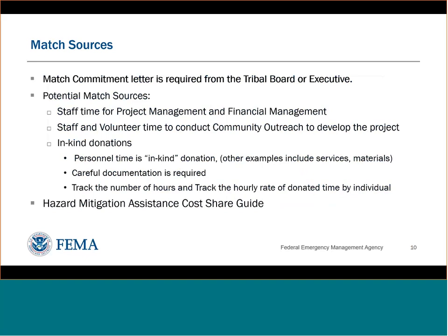In addition to funds from the tribe, potential match sources could be quantified staff time for project management and financial management, and quantified staff time and volunteer time for community outreach to develop the project. Could also include in-kind donations, such as personnel time, services, or materials.